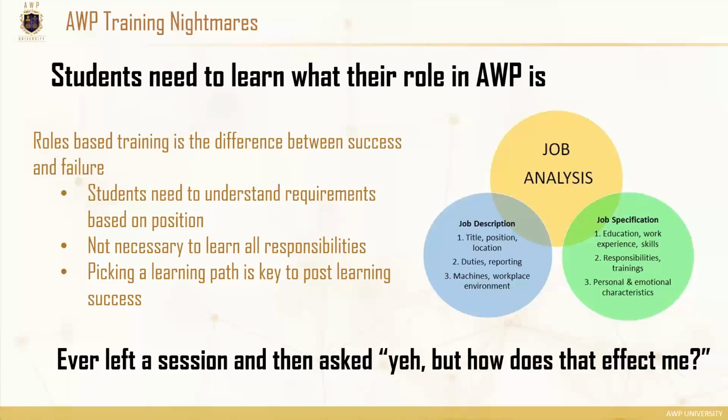So when it comes to managing the data aspects and getting the alignment for this to pass through the tool sets to be consumed at the construction level, your stakeholder influence, as you know, decreases the longer a project goes on. So if we haven't seen that this is tackled appropriately early on enough, your engineering design teams and your procurement teams have taken decisions that are hard to unwind if you don't have the construction teams engaged early enough.